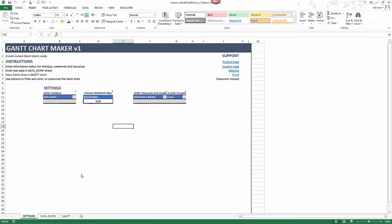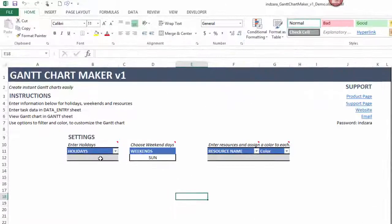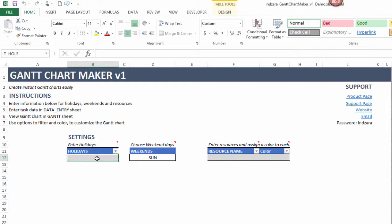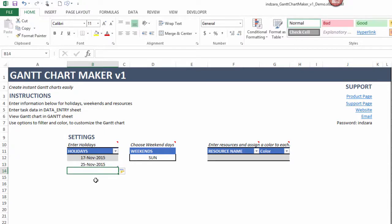Now I have the copy of the template open. There are three sheets in this template: the Settings, Data Entry, and Gantt Chart. In the Settings sheet there are three key inputs that you need to provide. The first is the list of holidays you want to exclude as working days from your Gantt chart. For example, I'm going to enter November 17th and November 25th as holidays. You enter data just below the title 'Holiday', starting from row 12.